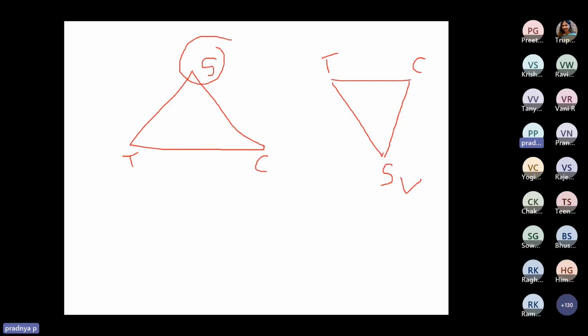And this scope will drive the changes, will drive our agile practices. So we need to decide on the prioritization. Within this milestone, from the perspective of agile development, which are the most valuable deliverables to the customer, and how we can plan our agile iterations accordingly. And then we will need to have the customer in sync with us, that based on the scope perspective, the low priority or the low value requirements may not be achieved with this fixed price and that time bound, milestone bound delivery.